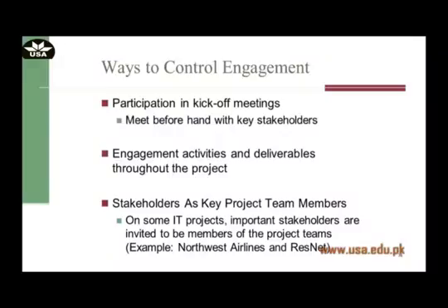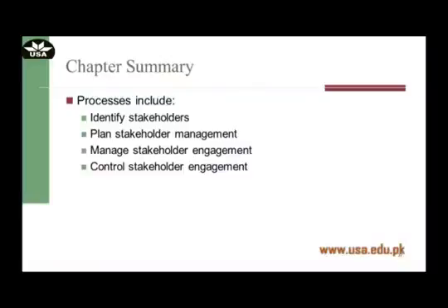Many IT organizations, whenever they take up a huge project, for example Northwest Airline or some other IT company, invite employees from the client organizations to come and work with them so that they can have quick, ready feedback from the people who are going to use that very project. So instead of just inviting them to be part of the planning process, you should be inviting them to be part of the team which is going to conduct the implementation of that project. So this brings me to the end of today's lecture.